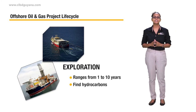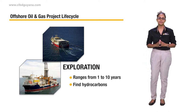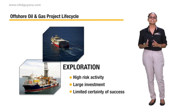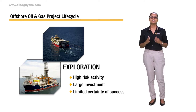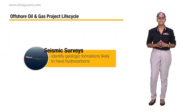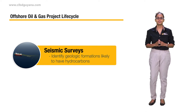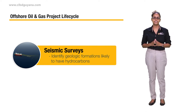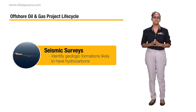Exploration ranges from 1 to 10 years and involves all activities to find hydrocarbons. Searching for oil and gas is a high-risk activity, and despite the cutting-edge technology employed, millions of dollars are invested with limited certainty of success. Seismic surveys are among the first activities to take place, conducted by teams of geologists and geophysicists. Put simply, seismic surveys provide geophysicists with an image of the sediment and composition of materials under the seabed.